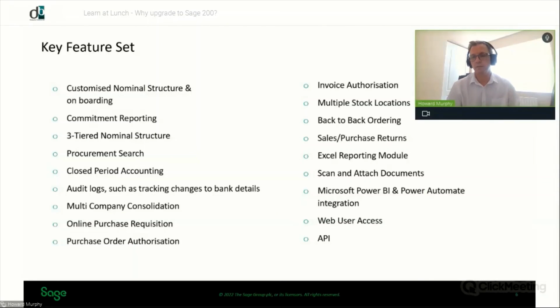We will lay out a full project plan from start to finish and have a weekly 15-minute meeting with everybody to discuss exactly where we are, where we're going, and what will be covered in the following week. Then, aside from training and everything else, we'll cover a straight handover at the time of go-live, and then we'll usually have a follow-up a month later to see how you're getting on and to review the actual processes.